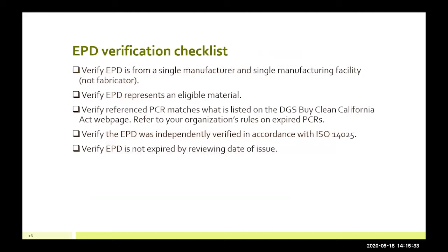Some awarding authorities have mentioned to DGS that they may have different rules on expired PCRs. For example, in the second scenario in the previous slides, where I talked about there might be a project that spans over 2 to 3 years. Well, PCRs are generally valid for 5 years.